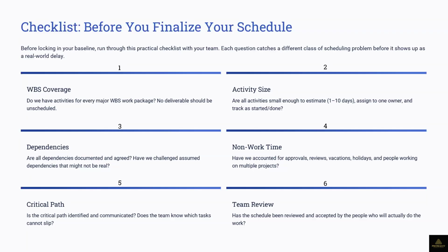Because one of the things you do weekly as the project goes on is a weekly internal meeting, where you meet with your internal team and ask them how far they have gotten. For very big projects, we meet on a daily basis, basically if you are working on a site project. But when you're in the office and the guys are on the field, you meet every week. That's what I do most of the time. We meet internally every week.